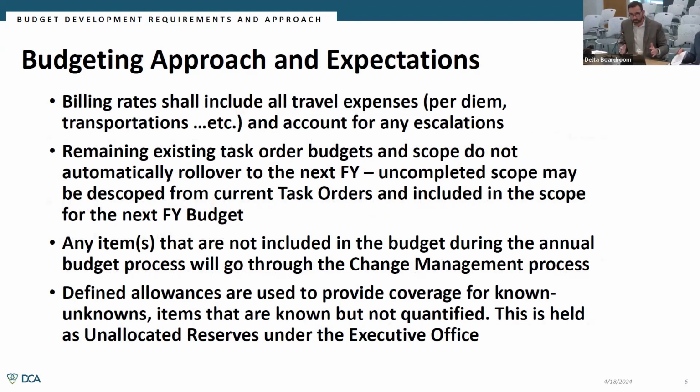We don't cross them. A couple of years ago, when I was starting, we would extend task orders on a case-by-case basis. That had some advantages, but it had some disadvantages. The biggest disadvantage is that we were not able to close out the financials for the previous year for several months, trailing behind the completion of any extended task orders because we have to get final invoices. Sometimes those would trail. All that stuff has to get processed, paid out, and eventually we're able to close the books. So it really delayed our ability to conduct our annual audit and delayed our ability to close out the finances.